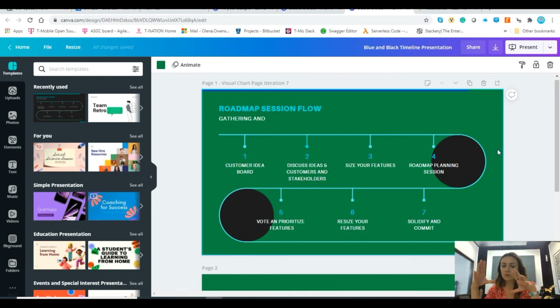Here's our amount of story points. If something looks like it's not as important and there's something else way more important, we can discuss that and swap. You can't add on because there's a limit on how much your team can deliver, but you can switch things around based on your discussion with customers.